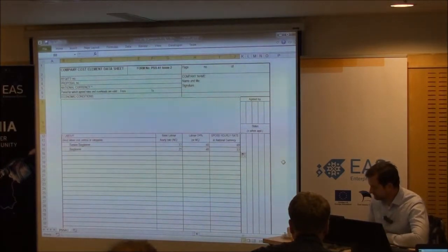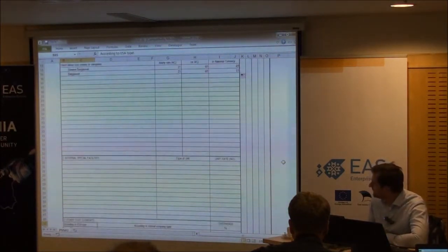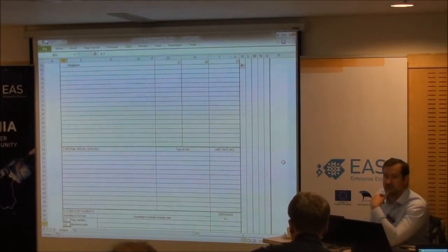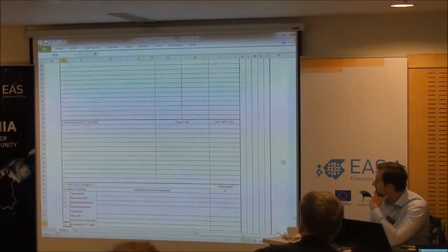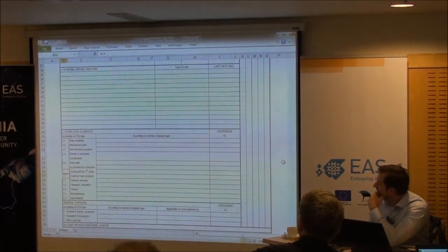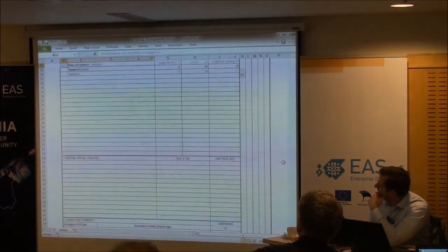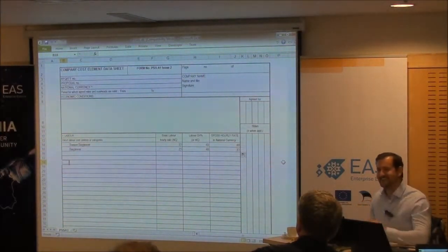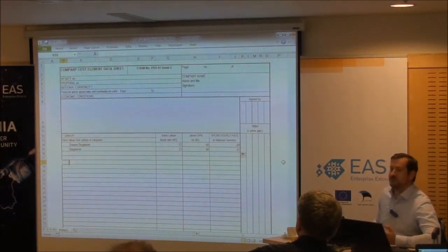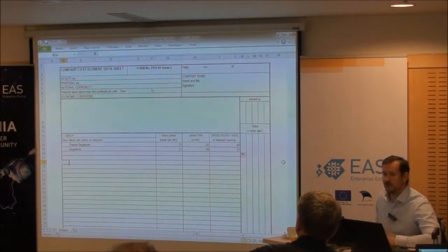As you come down the form, if you've got some particular type of facilities that have a specific kind of cost that's determined, I have to admit I've never used that. And again, some overhead breakdown. Lucky for me, I only tend to work in labour, so it's nice and easy. So okay, does that make sense? Pretty straightforward. Basically, what's your raw unit cost per hour for what type of categories you've got? That's your starting building block.